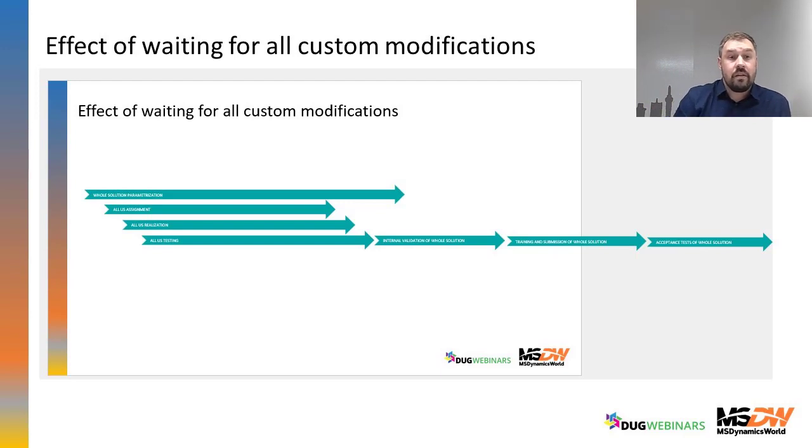And we really know such things like you needed from the developer to do something, and later the process changed and they had to redo this. So there were more costs of time, effort, and money to make things again. And of course, customers don't want to pay it.